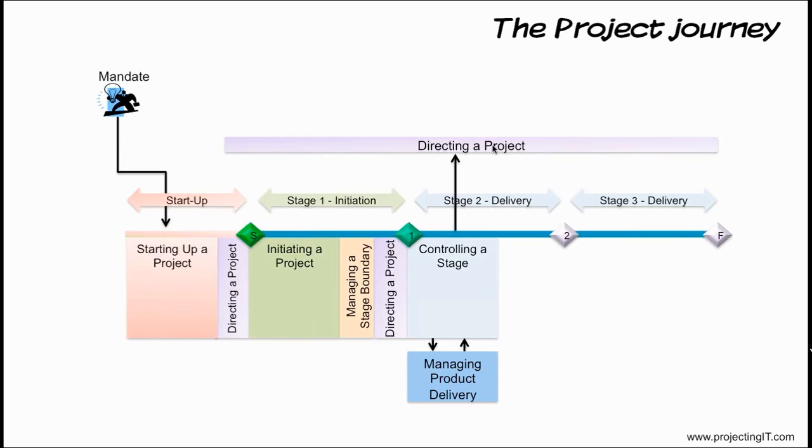The project board can advise the project manager if the tolerances are exceeding at the stage level but do not affect the tolerances at project level. But if the tolerances are exceeding at the project level, the board will alert the corporate, who only can make a decision. If the exception is accepted, the board can ask the project manager to prepare an exception plan which will replace either the current stage plan or the project plan, that is, whichever is in exception.